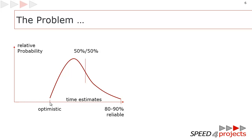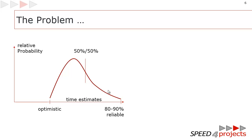There are two interesting points: the optimistic one, the smallest ever possible estimate that will never occur, and on the other side, disruptions and delays. So the curve is not like a bell curve, it's elongated on the right side. When we are asked to do an estimate, we typically estimate something around 80-90% reliable. It's a gut feeling we have, and with this we typically feel safe.